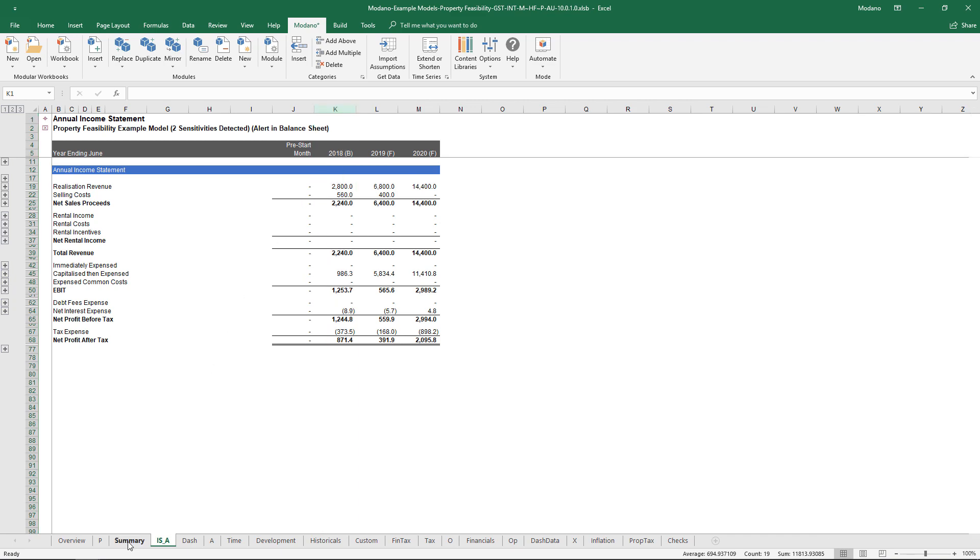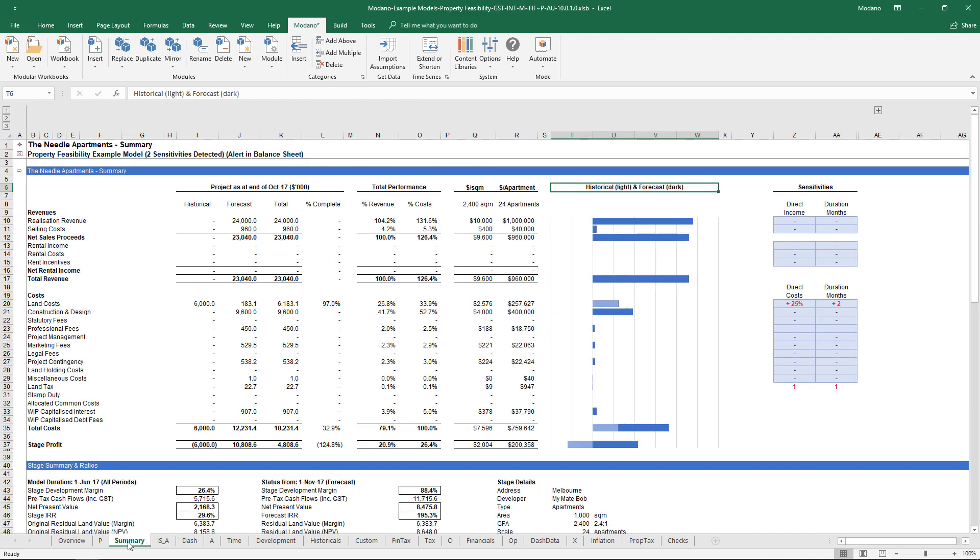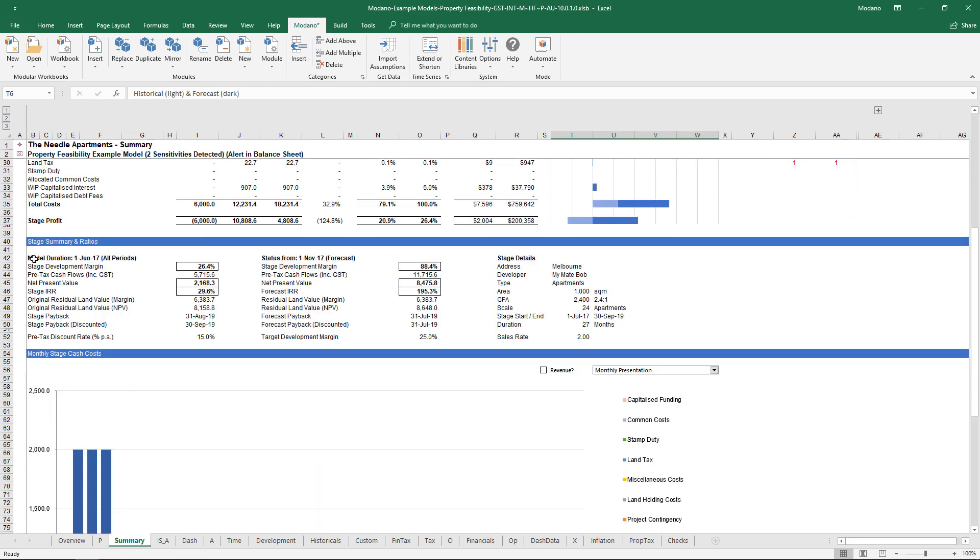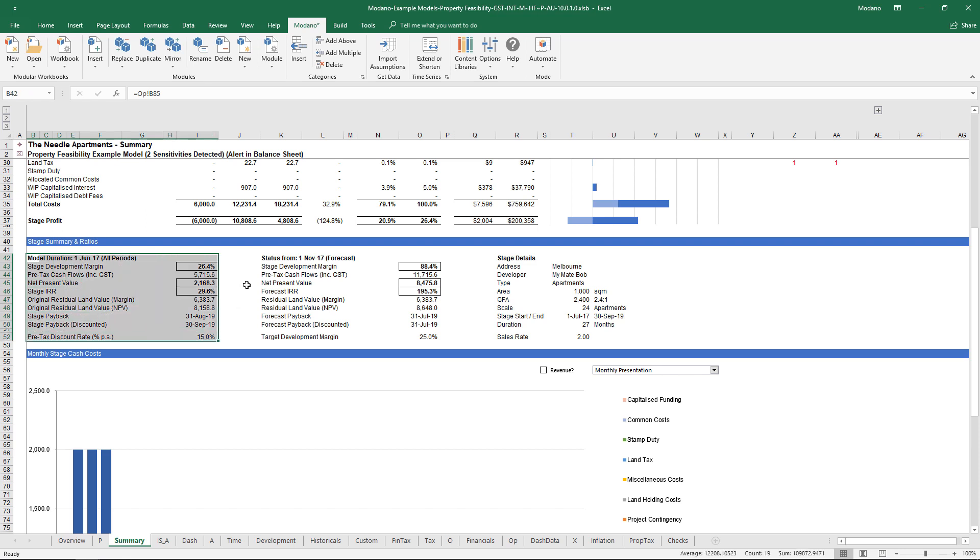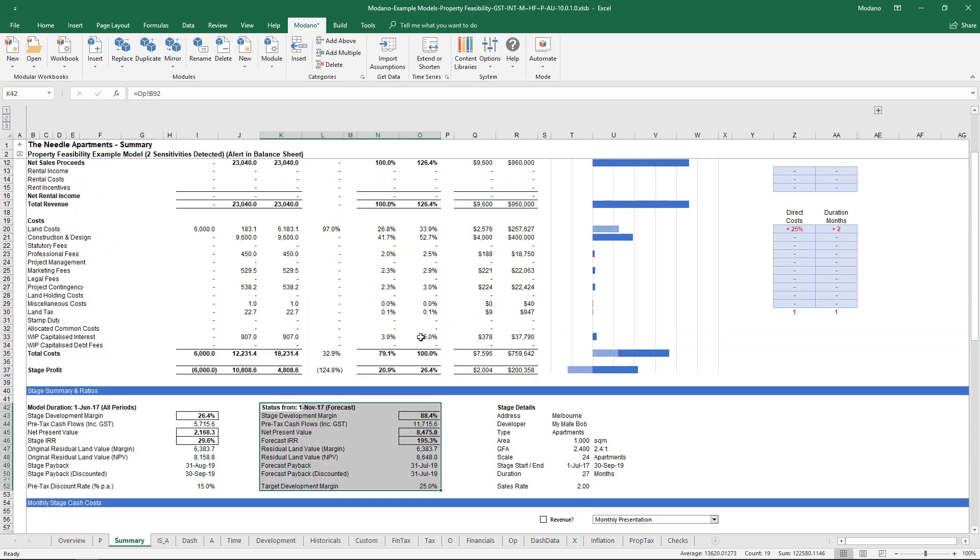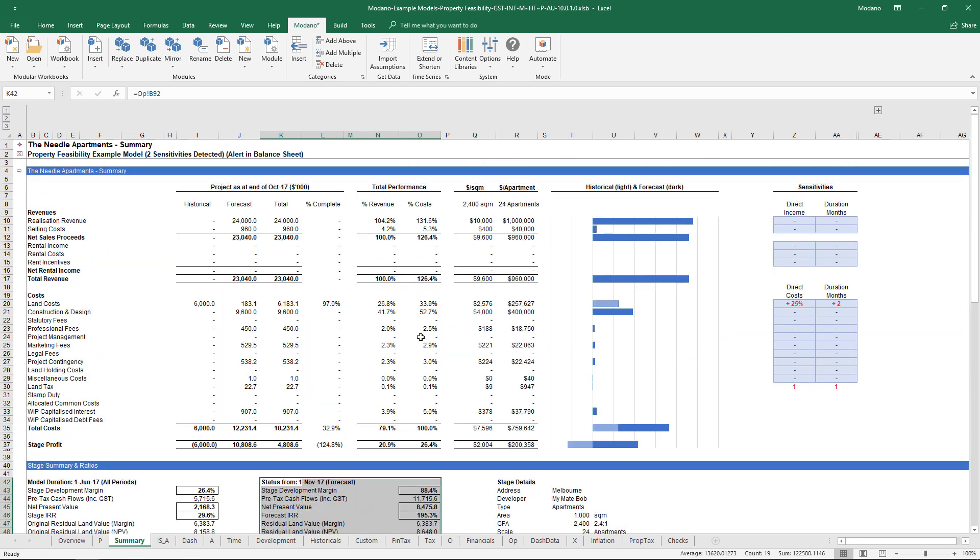If we also head over to the summary side of things, you'll see we've not only got what is the entire project return looking like, we've also got a status as at our last historical point in time. If we were to pick up this project as at now, all costs considered, what's the remainder of the activity looking like in terms of where the project's currently at.